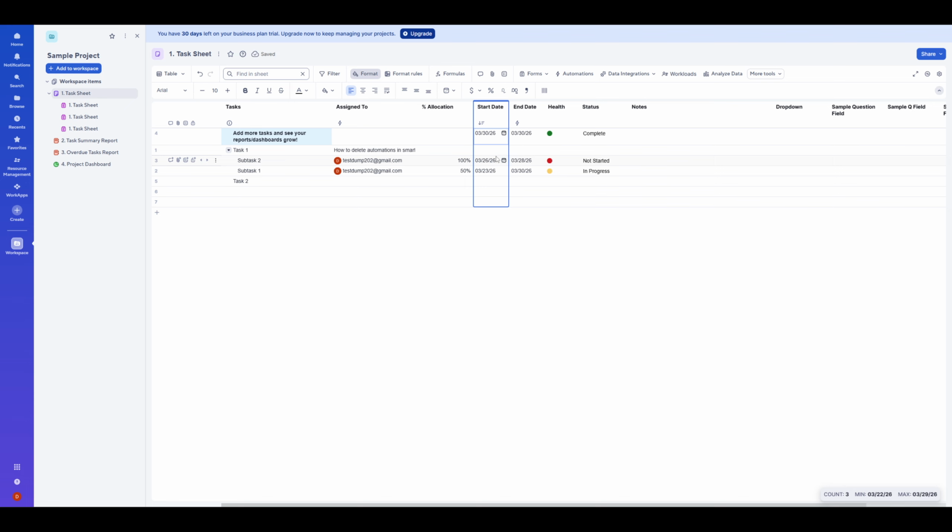As soon as you click your preferred option, you'll see the entire sheet rearrange. Smartsheet moves full rows, not just the date cells, so all the information in each row stays together across columns. This makes it safe to sort without losing the relationships between your data. If anything looks off, double-check that all entries in the date column are valid dates. Mismatched formats or text entries can cause items to land in unexpected places.